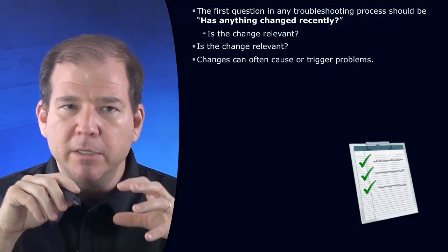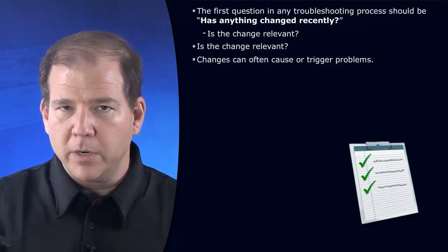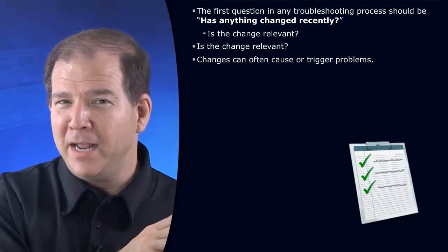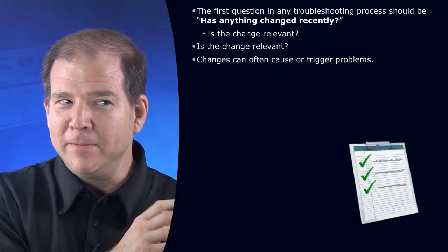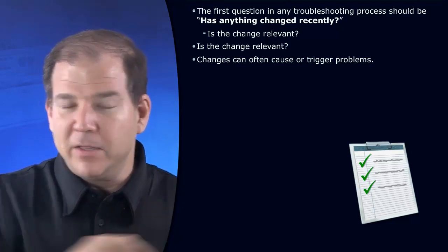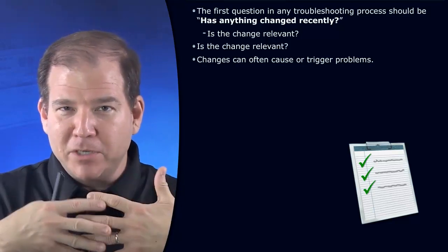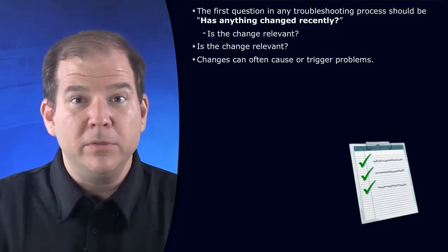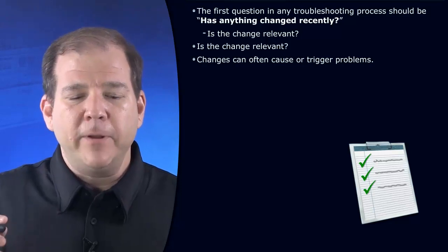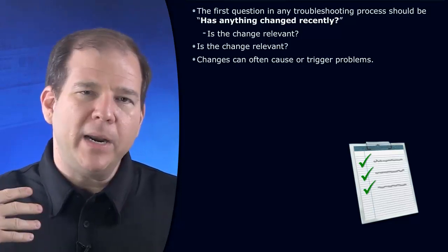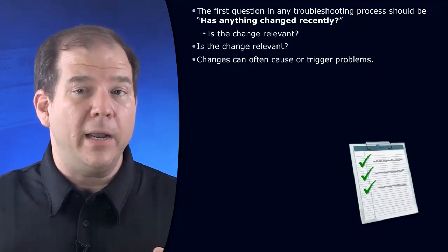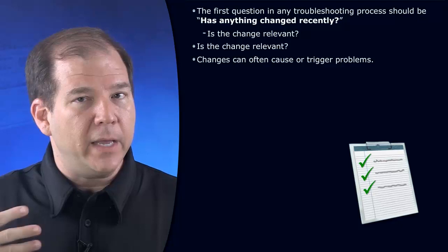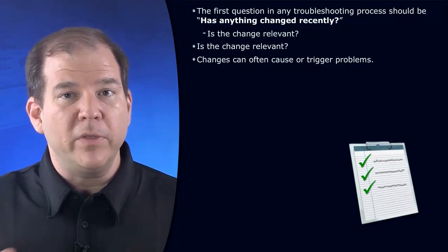Let's think about this for a moment. If your department is just one of multiple network departments in your company, if you do something and you don't tell the other network department about it, is it possible that they're doing something that evening, that you're doing something, and those things could conflict with each other? You bet there's a possibility that could happen. What a lot of organizations do, and I would say it's a best practice, is we have a change management system. So if I'm getting ready to make a big change on the network, I notify other people in my department that I work with that, hey, this change is coming. Make sure that it's okay with you. It's not going to interfere with anything you're doing.